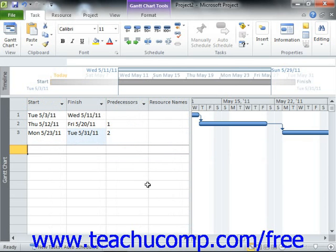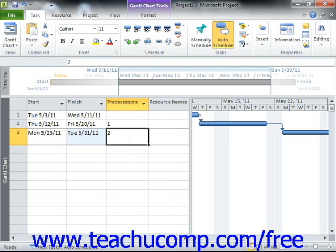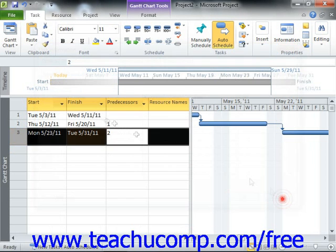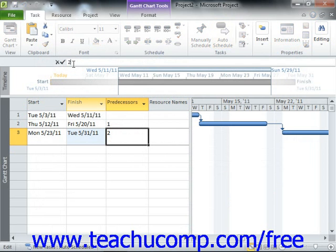To add a lead time, you would enter the precedent task reference, followed by the abbreviation for the type of link that they share, and then enter the value as a negative value to the precedent task reference. For example, assume that you have linked tasks 2 and 3 in your project file with a finish-to-start task relationship. In the predecessors column for task 3, you could enter 2FS-2D, which would give you a 2-day lead time on the task.